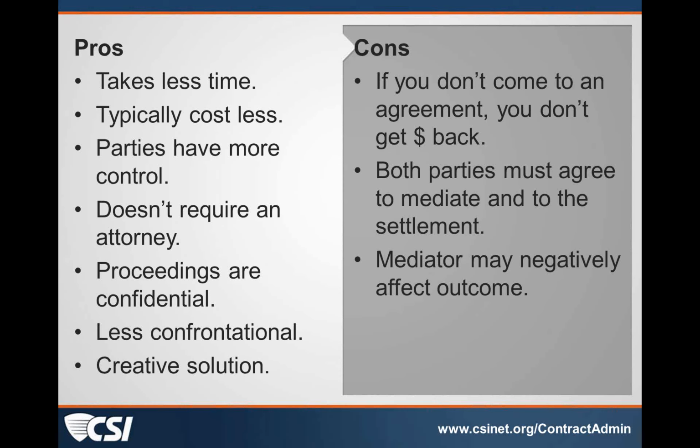If you don't have it in your contract and the contractor is delaying, not getting you the information, the work is done, and he can't get the subs to submit the claims, I think as the holder of the purse strings, the owner is in the more powerful position, so to speak. By just withholding retainage, he can have a vehicle to help force the contractor to be responsive.